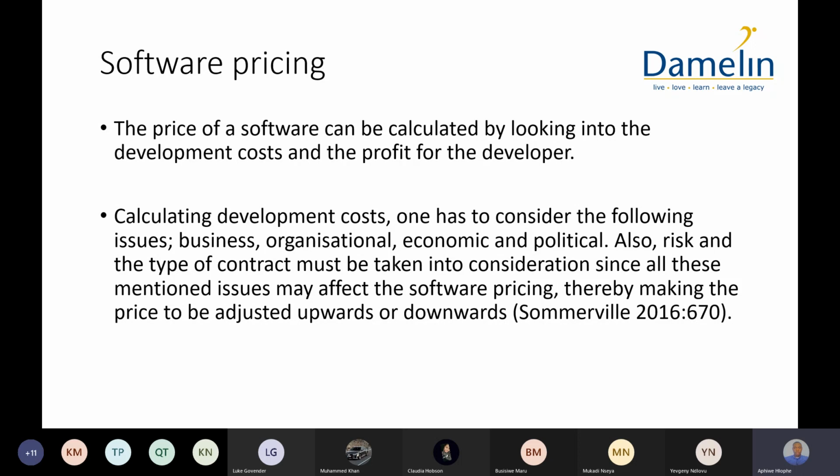Okay, so also it's very important that you consider other factors, external factors to the organization that will force you to build a software in a particular way in terms of compliance. So you have to be compliant, and that will add additional costs. The contract, the type of contract, you don't want to promise to develop an agile project for a fixed amount, because you know that these things are subject to change. So build them in a flexible manner where you tell them that it's fine.